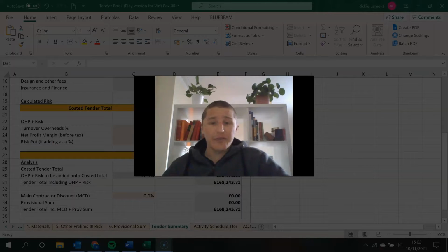This is just a quick how-to video on calculating risk. So first up, why is risk important? Well, you'll find that in 90% of cases, that risk is transferred to you from a main contractor if you're a subcontractor. How do you know this? You know it by your contract. So reading and understanding the contract and understanding what risk you are carrying when you're pricing is quite important.